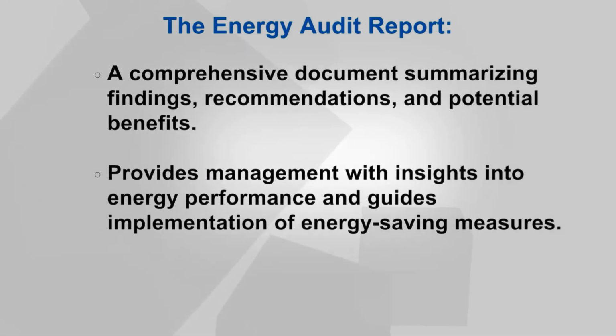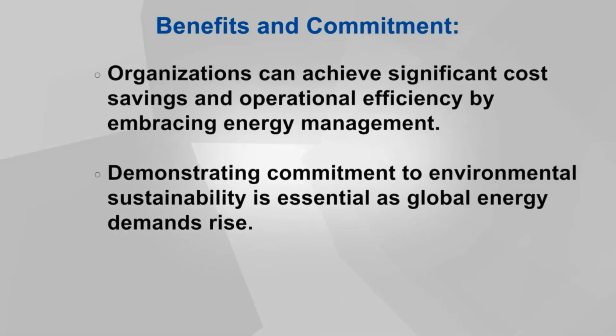What are the classifications of ENCON measures? They are classified as low, medium, or high cost. ENCON measures can be classified on their cost and potential return on investment. Low cost, high return measures require minimal investment but offer significant energy savings, such as optimizing existing systems or implementing simple operational changes. Medium cost, medium return measures involve moderate investment and provide reasonable savings, such as retrofitting equipment or upgrading control systems.